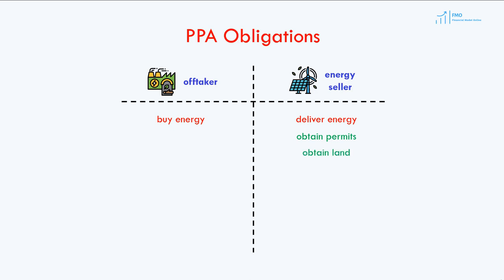Sometimes, this obligation related to permits and land can be shared with the off-taker, especially in emerging markets, where the off-taker is usually a government-owned entity. The energy seller is also responsible for arranging financing, construction, and operation of the project, including the construction of interconnection facilities.